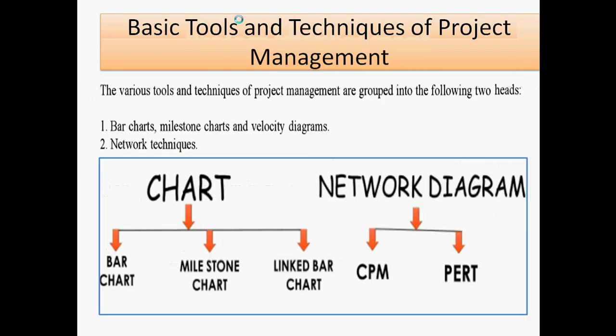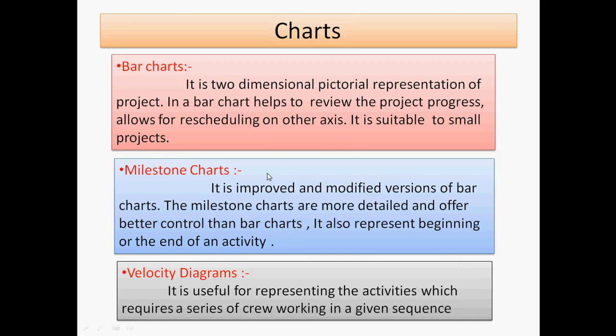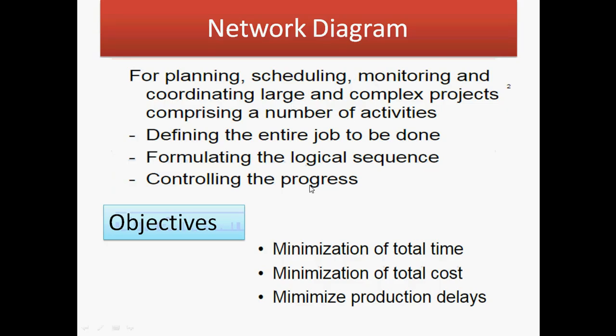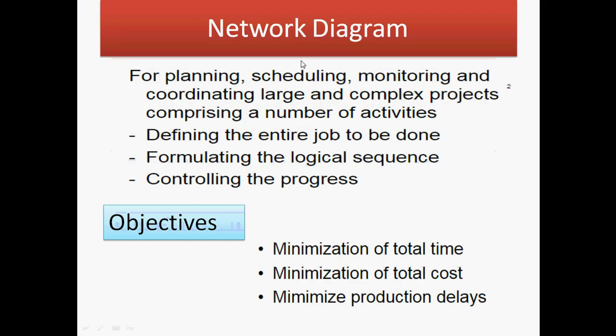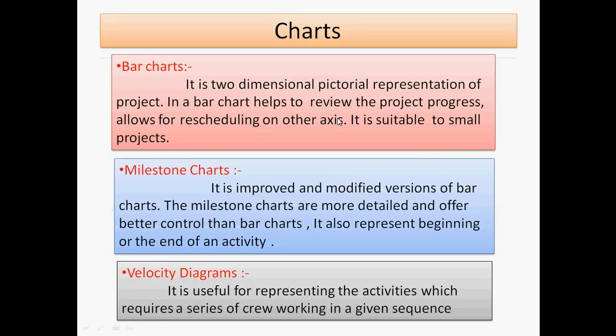And for achieving this project management, we use different techniques, that is charts and network diagrams. Charts are the traditional way, not used much nowadays, but you go for network diagrams for large scale industries as well as small scale industries. But if your project is small, don't go for network analysis, go for chart analysis, because in network analysis more and more data is required, but in the case of charts only a two-dimensional format is required, so x and y values. Again we can check the review of the project process. So this is about charts.